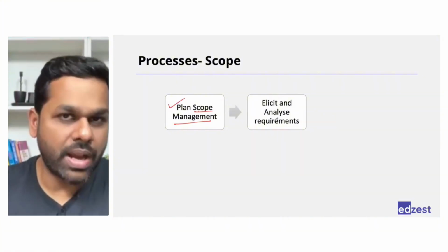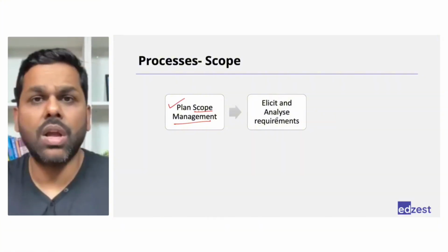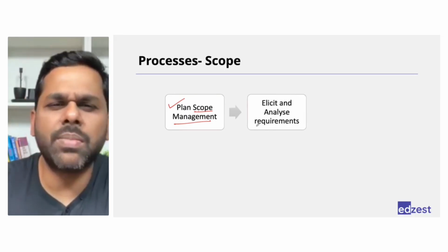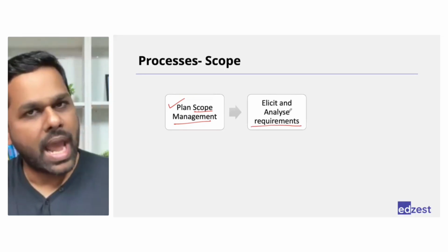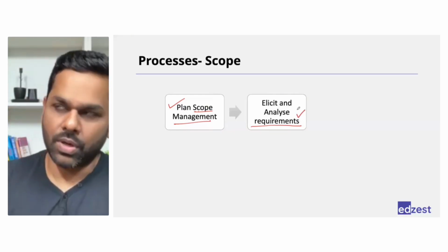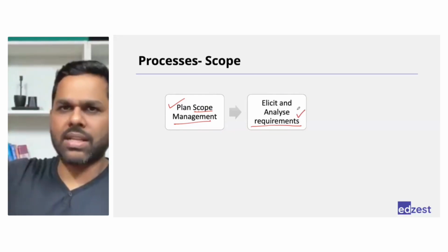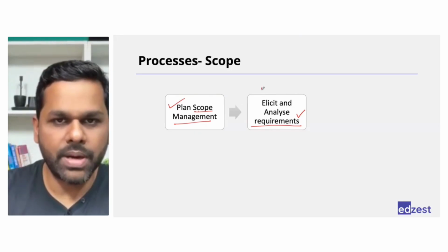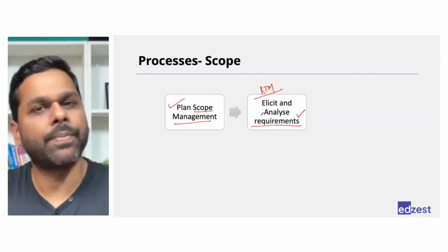After that, start collecting requirements. Talk to customers, talk to management, talk to team members, go through multiple documents, carry out benchmarking, and figure out as many requirements as possible. Analyze it, refine it, get it signed off. So create a requirement list and take a sign off that yes, these are the requirements that we have noticed in a requirements traceability matrix.